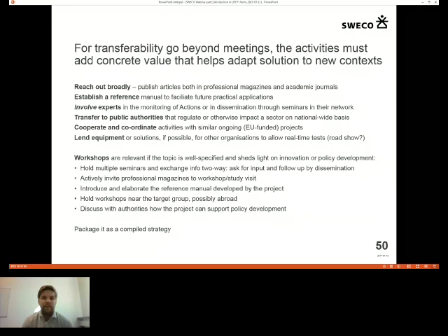You should hold workshops. This is a quite good recommendation. They all are, but this is specifically good, and it might not feel realistic. You should hold workshops near the target group to make it easy for them to come and provide input. So it's possible to hold workshops abroad. For example, our Swedish LIFE project plans to have a number of workshops in Germany as well as perhaps in Switzerland, to get close to the target group, to first of all get their input and then provide our concept further for application. Then, of course, you need to keep in mind the CO2 costs of the project. Perhaps it's better to hold webinars, but usually when you want an efficient replication effect, you need a person to stand there, in flesh and blood, to explain to farmers what's happening, basically.